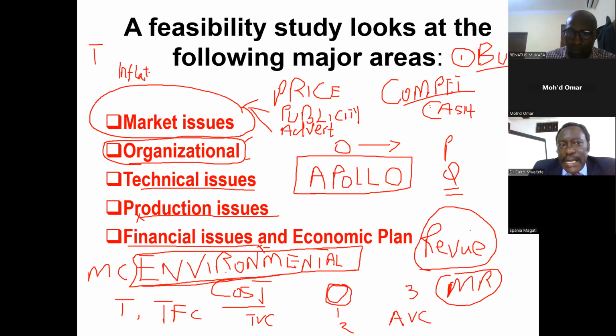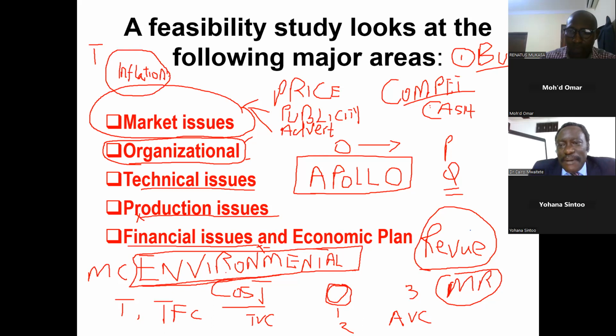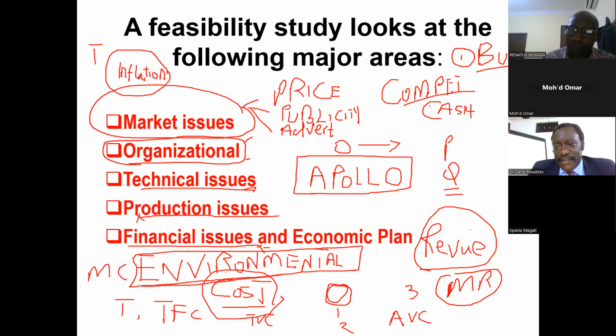Yes, very good. Inflation, most of the time, when you are doing your budget, you will have contingency in your budget. So when you set costs, you take allowance for contingency. Now, when you set contingency allowance, it by itself will cater for the problem of inflation. So this will be automatically addressed. Is that okay, Mohammed? Yeah, thank you, sir, very much.